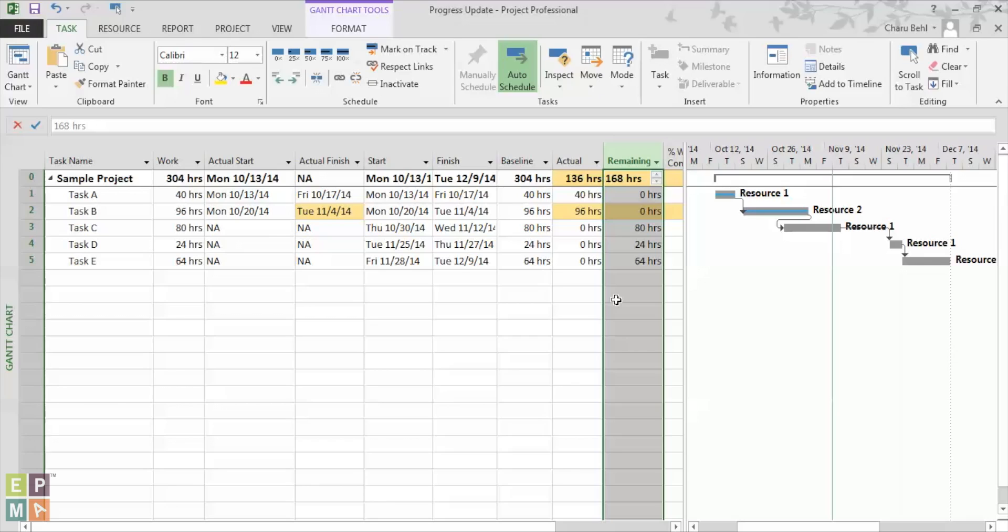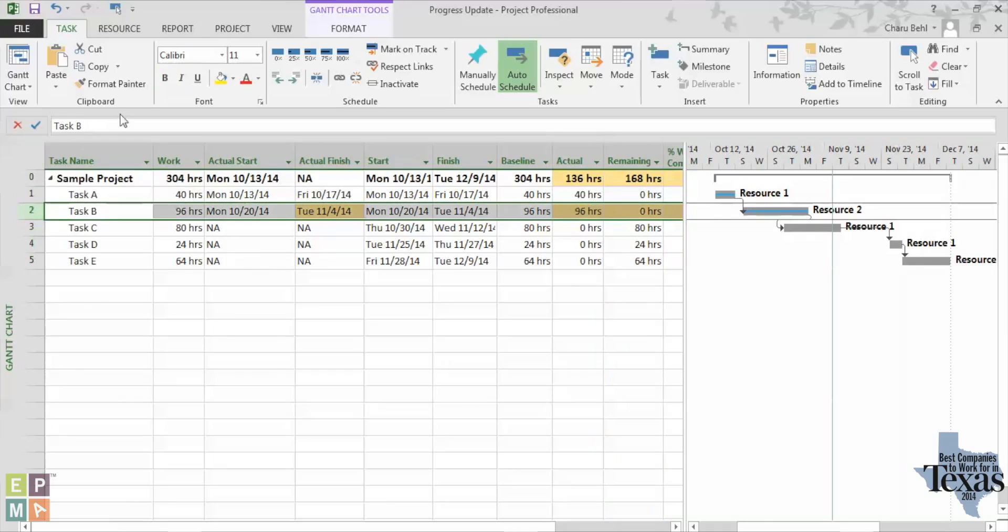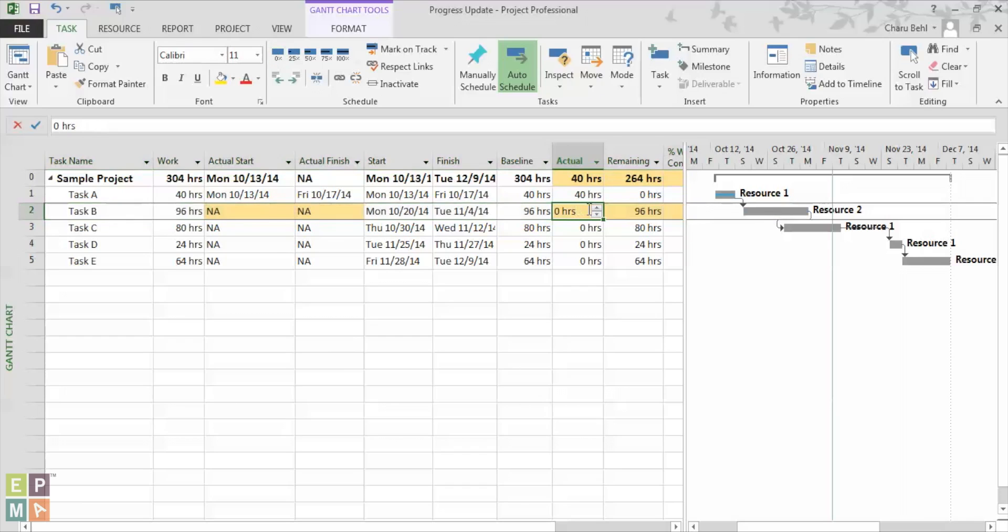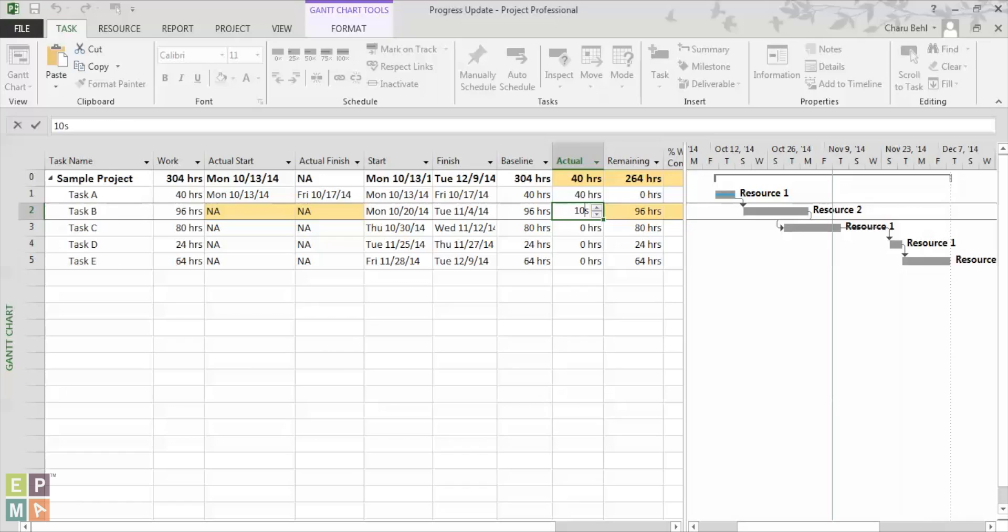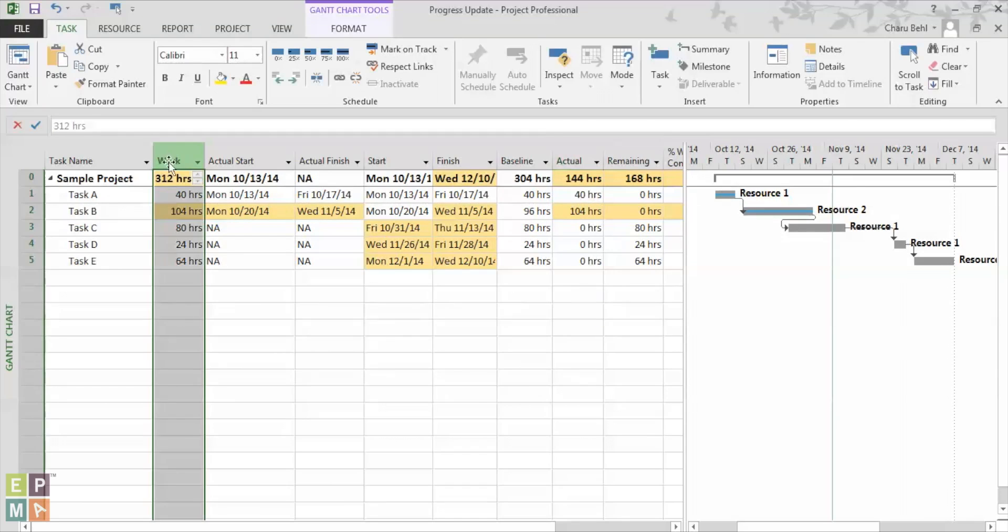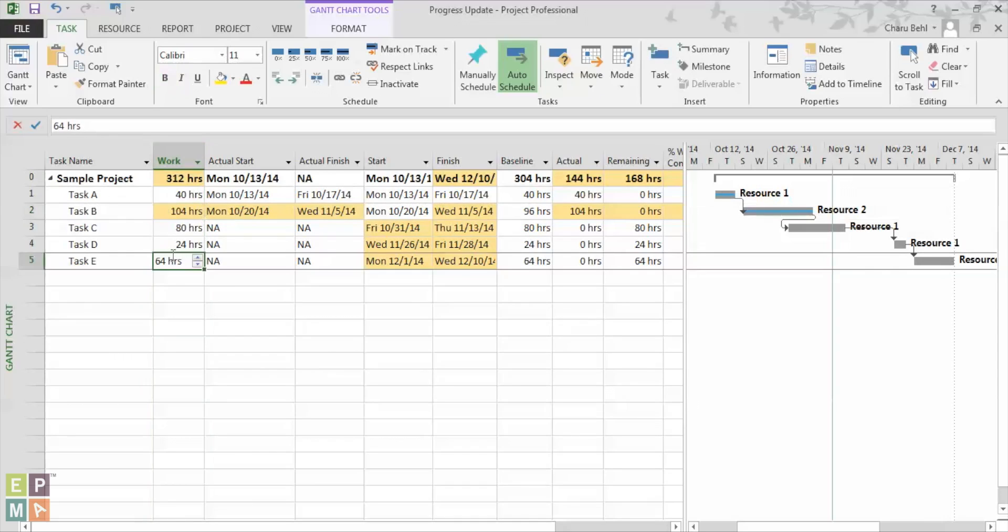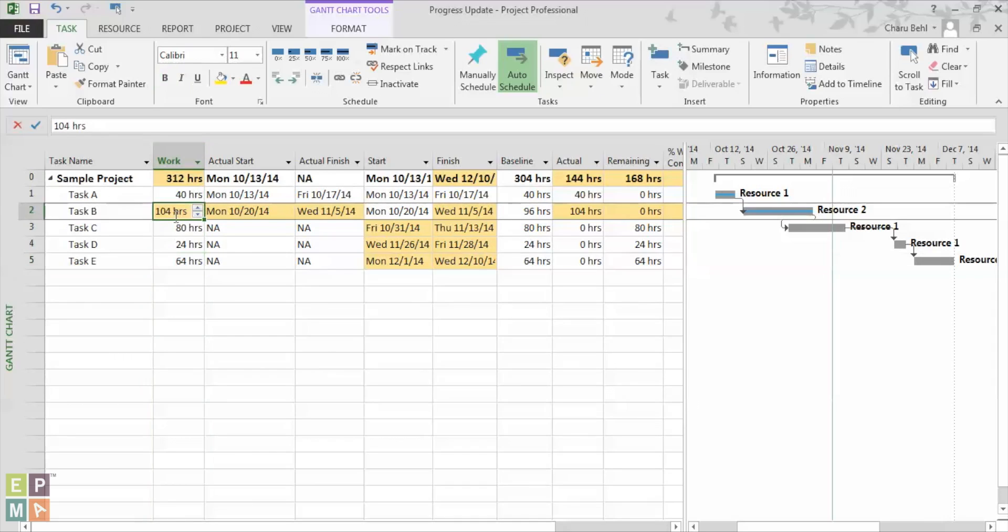Now for example, the number of hours that were actually put into this task were more than say 96 hours. So what happens if I enter 104 hours? You see that again, the scheduling engine makes way for 104 hours and the schedule is pushed out by a day.